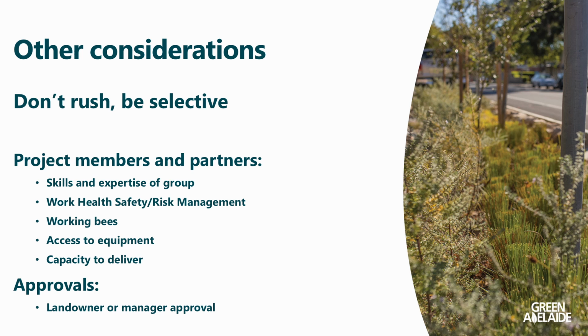Looking at risk management. So in the guidelines, you might have already seen that projects above $50,000 require a separate risk management plan. Those under $50,000, there's some questions you have to answer in the application form. So certainly think about any risks and how you might mitigate those.